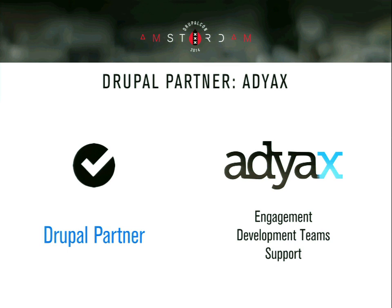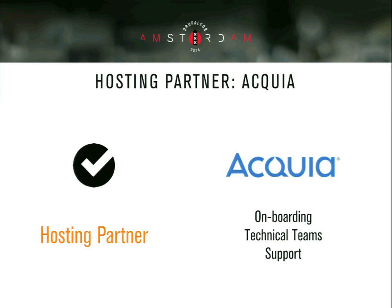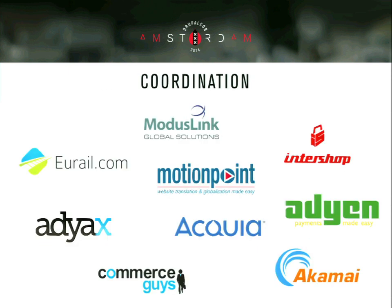So in the end, we selected Ajax for a Drupal partner, and Acquia for our hosting solution. And then, before we start the project, there are a lot of advantages of having all the expertise outsourced, but there is one disadvantage, and that's when you start a project like this, because it's a huge project, and all the suppliers have to be in sync. So if you change there, it can affect the other supplier. So that was a real struggle during the project.